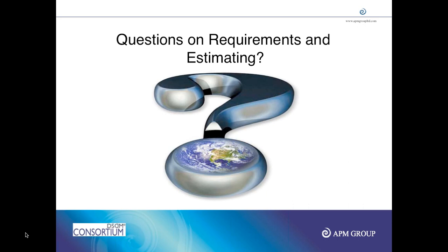Now what happens is, if you have a change request and it was already part of the baseline requirements list, it's not considered a change request, and it can be decided by the teams themselves, because it's depth that is being added. If you get a change request which is not part of that baseline, then you consider it a deviation, or an addition to the scope. That should go through proper mechanisms, be approved, and only then be included.